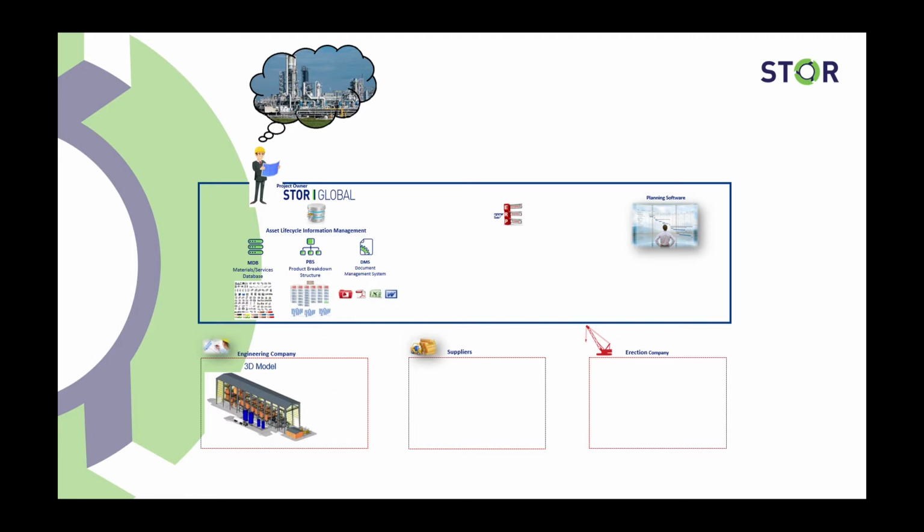Once receiving those boons, the focus will be back to MRP. The MRP system will be responsible for calculating the proper quantity of materials and services that must be acquired to supply the project demands. Once the calculation is made, the MRP will also generate purchase requisitions following the project requirements and will synchronize with the ERP system automatically.